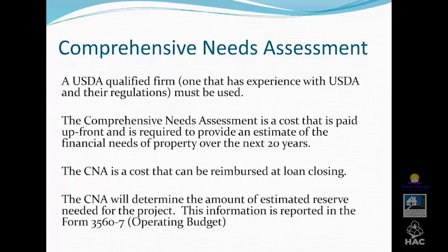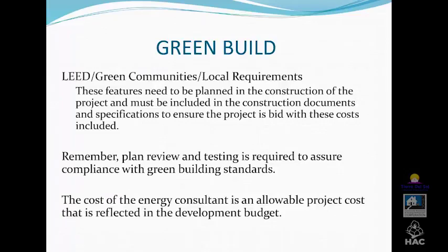They will be involved during the construction of the project because they review the plans and then they do periodic testing on the project to assure that it has met the green component standards. Again, the cost of the energy consultant is allowed in the project costs, and you can be reimbursed for their cost, or you can do construction draws as you go for their services. This person should be part of your development team from the get-go.